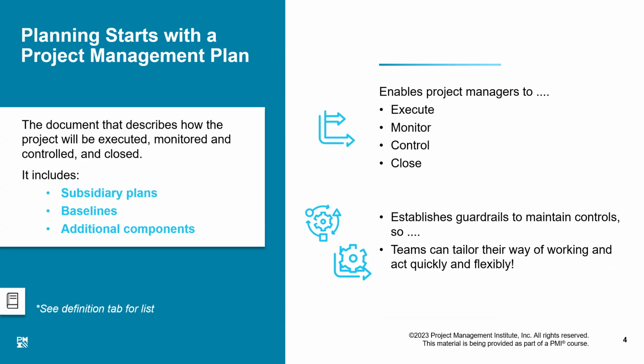Okay, so these 3 project objectives, the basic project objectives, scope, time, and cost, when I formalize and establish my scope, I have to baseline it, I have to freeze it, I have to get it approved from the bosses of the project, and that is called the scope baseline. Similarly, when the schedule is finally established and approved by the bosses, then it is also baseline. So that is the second baseline. And the third baseline is cost. When we establish the cost of the project, again it is approved, and it also becomes a baseline. When these three baselines are established, the project is considered to be planned. The planning of the project is considered to be complete.